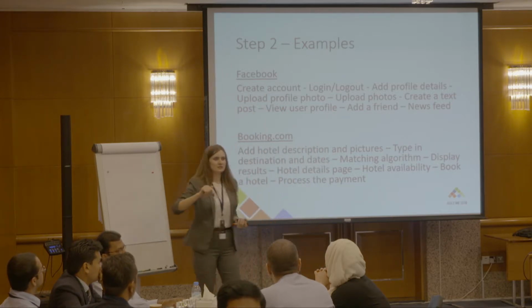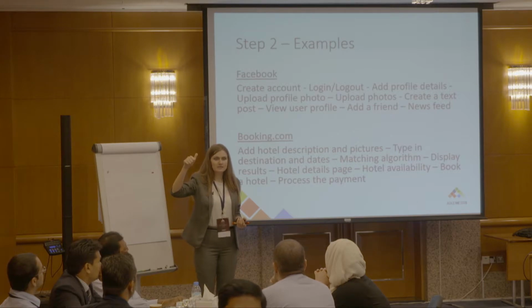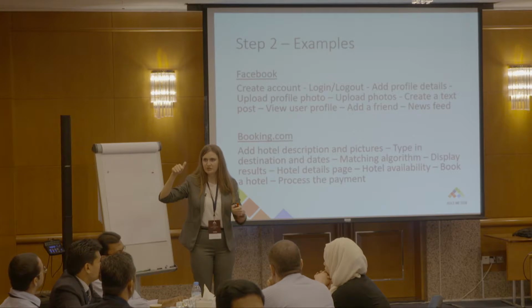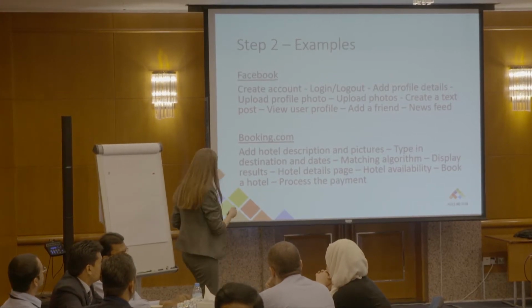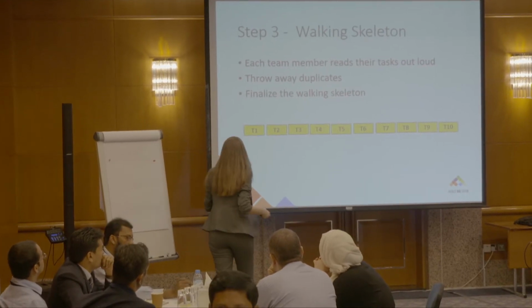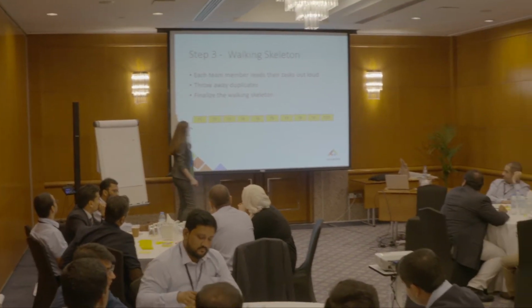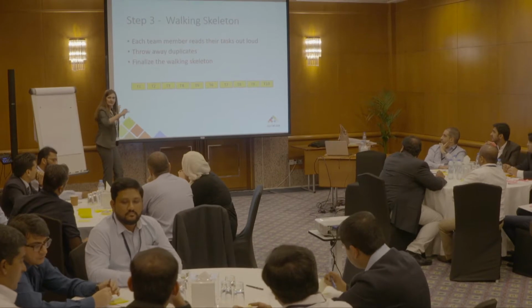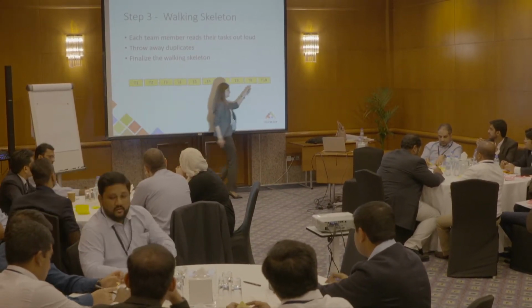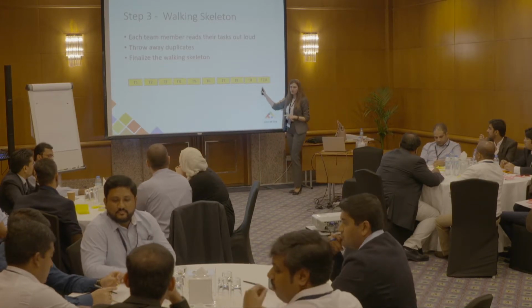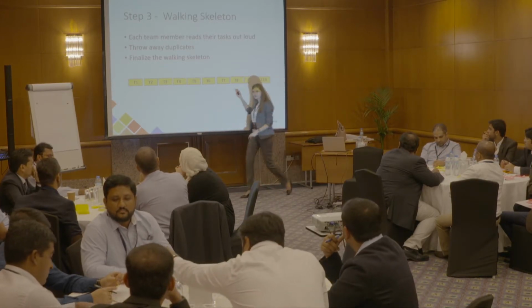You will do 2 things. First one is we will remove duplicates. In case 2 members have the same sticky note, we will remove the duplicate. And the second task is to make the walking skeleton. So in the horizontal line, place these sticky notes from the starting point till the exit point of your app. So let's create the basic flow.